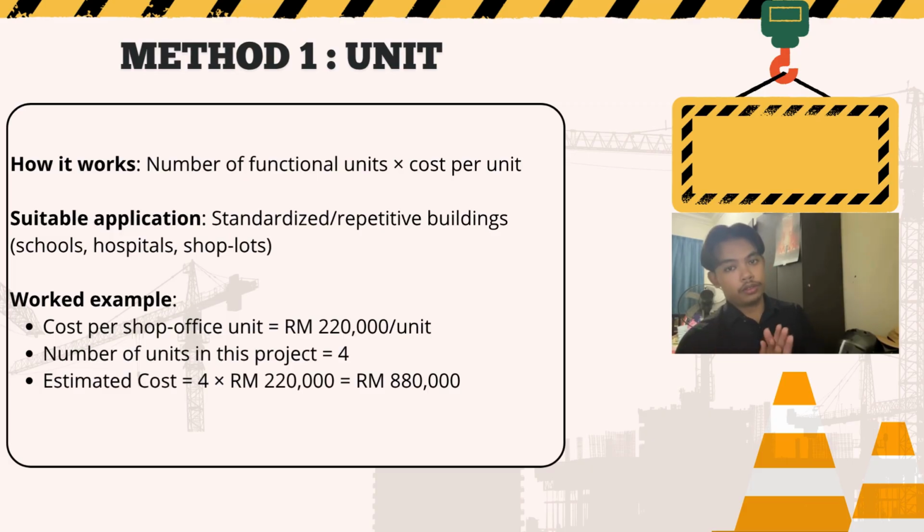A worked example that I can give is: if the cost per shop office unit based on a similar completed project is 220,000 ringgit, and our project has 4 units, then the estimated cost is 4 times 220,000, which equals 880,000 ringgit.